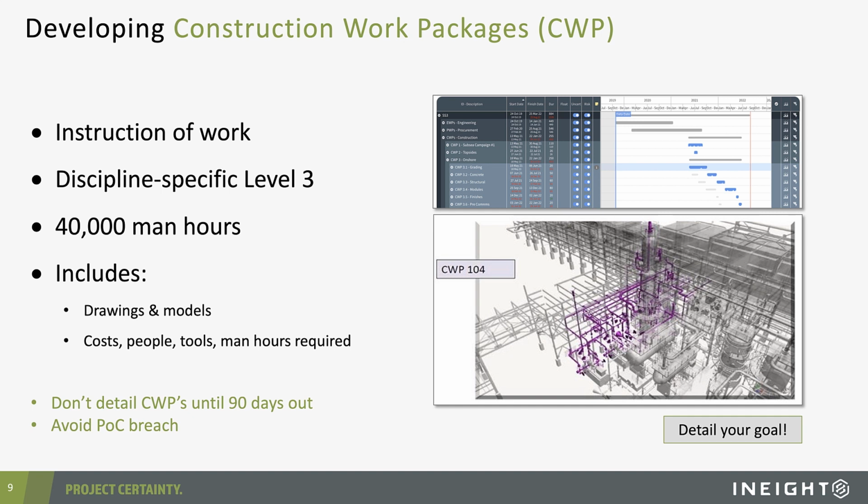I think, again, some of the magic that AWP brings to the table is then the concept of once we've got these CWPs, then let's use our path of construction as almost like a bucket. We want to make sure that our CWPs adhere to those bigger picture bucket path of construction elements. So again, constantly using that path of construction as a framework, as a target. And again, that framework is all driven from right to left.